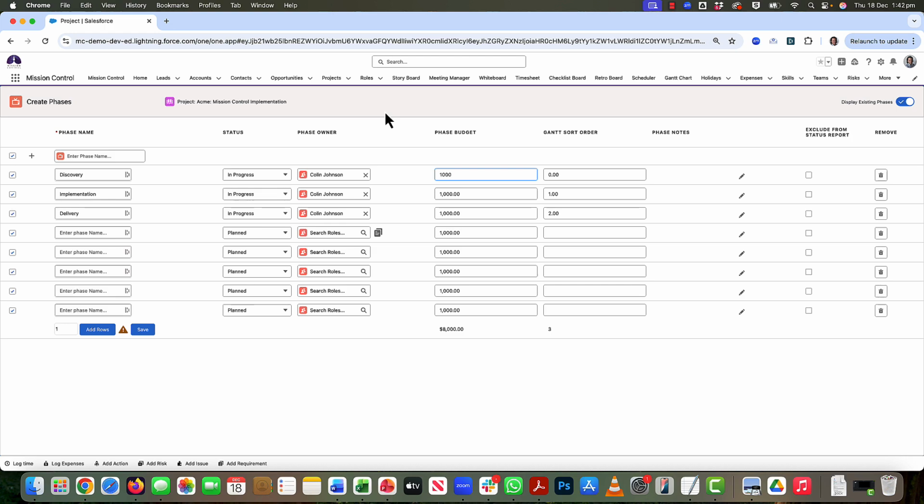By default, these are the fields that will be displayed, because most of the fields on the phase object get rolled up from related milestones. But if you are adding custom fields to the phase object, you can also display those. That's all managed through a field set on the phase object. So, as I say, very similar. Hopefully you're familiar with the same pages that already exist for milestones, actions, and checklists. Ultimately, now you've got that ability to manage in bulk all of the records at those four key work breakdown structure layers.